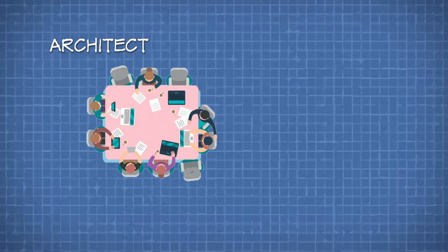Next, we move on to the contract implementation and management phase, where the building plans and wiring plans are all compiled into something called a tender document. This tender document will be let out for open tender among the contractors. The contractors then bid.